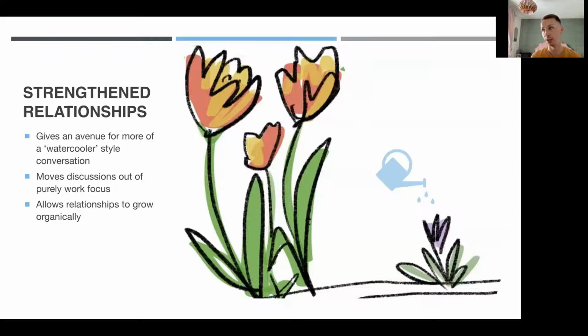I could even say, I want you to narrow it down to the top 5 post-its, ideas, topics, actions, experiments, however you want to phrase it, between that collective pair. So they're already doing some affinity sorting and prioritization. And then you could pair 2 pairs up and go, okay, you've got 10 post-its, 10 ideas, I want the top 3. So it's just moving away from traditional facilitation. Like I said, Liberating Structures is brilliant. It probably needs its own slot, but just make use of breakout rooms, make use of space, inject a bit of fun in there, and just change things up a little bit, keep people on their toes, right?